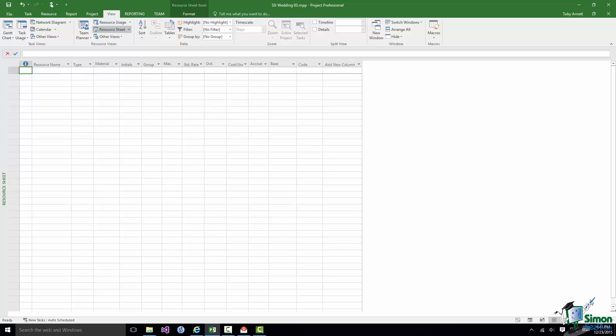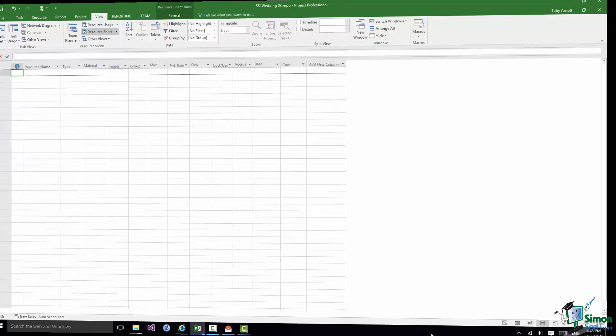The difference is going to be even bigger when we start looking at costs. For example the bride and groom wouldn't expect to charge their time on this project whereas the people working on the bathroom refit will be charging their time to whoever is paying for the bathroom refit. So there are many differences between these two projects in relation to how they handle resources and the associated costs. But I hope that by dealing with two such different projects we're going to deal with many of the situations that you're likely to come across in future when using Project 2016.